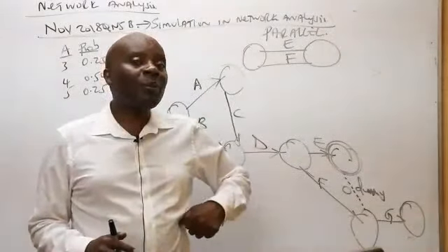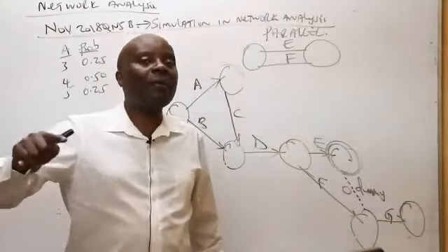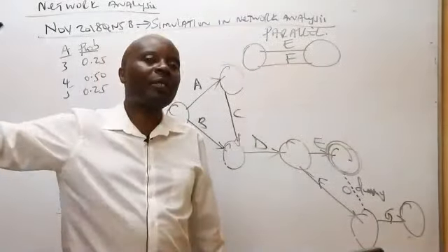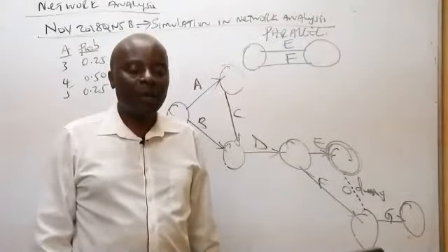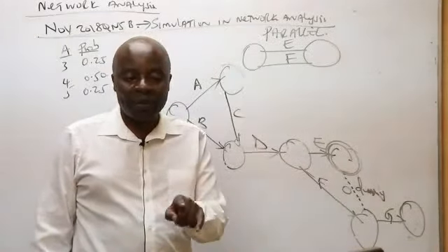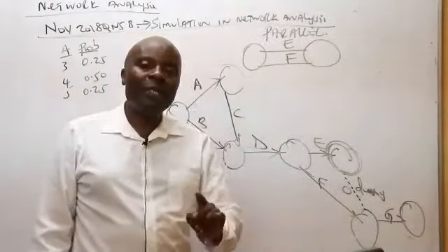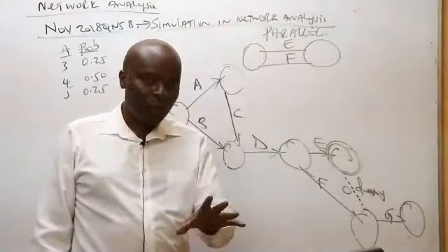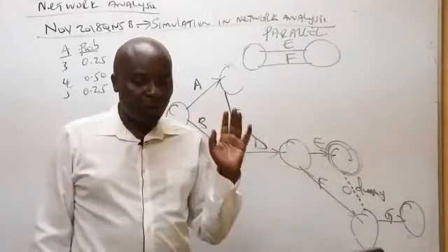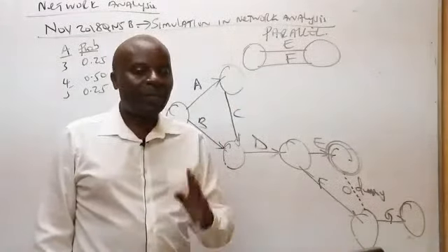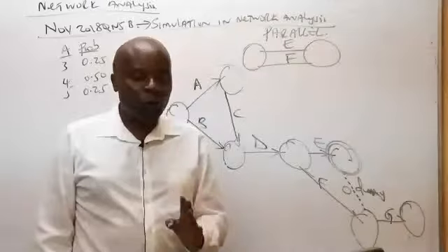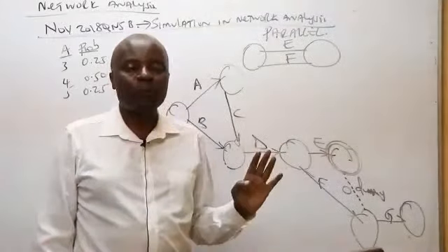Another student who is very bright will come and tell you that expected time is (A + 4M + B) divided by 6. Ladies and gentlemen, I would have done that if probabilities, thank you, Brian, but that's not the way here. Here, there is nothing like optimistic, nothing like pessimistic.